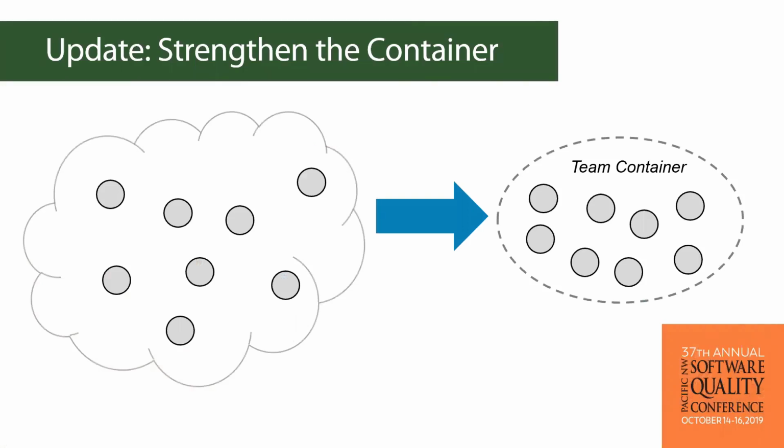Another update that I think is really important kind of takes this full circle back to the beginning of our talk. We talked about the big change between before retrospectives and when we started calling it retrospectives, which was cohesiveness and the focus on the team as the unit of management, the unit of work. So the thing that you can do at this stage, if your retrospectives aren't working, is to look and say, well, how cohesive, how focused is my team? And often, in fact, you find that the reason the team isn't able to progress is that they're not really enough of a team.